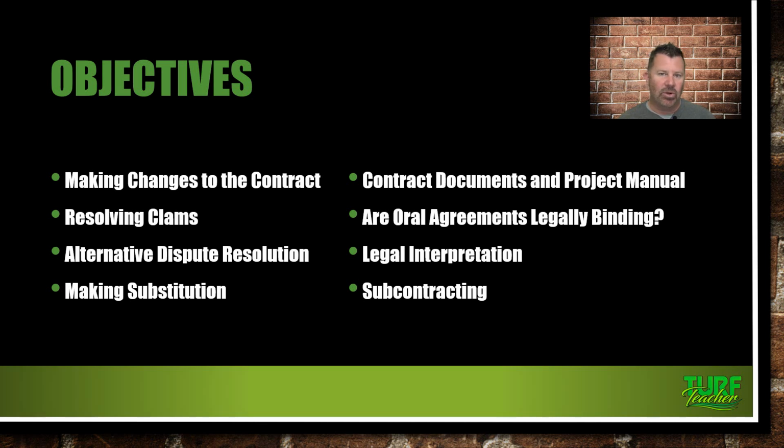So you got to make sure those contracts are legit and spelled out clearly for your subcontractors and for yourself as well, because there may be times that the pay application for you, submit the pay application by the 30th of the next month to be paid by the 15th of the following month. Well, think about, do that math. It could be 2.5 months sometimes before you get paid. And then they're going to take out retainage.